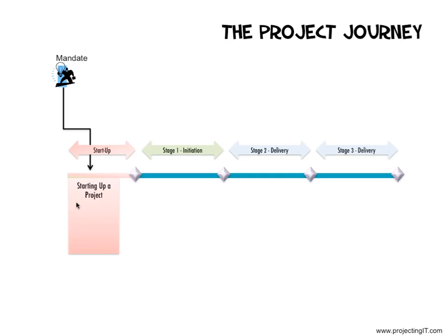All of this is defined in a PRINCE2 document called Project Brief. The project brief is used to decide whether the project should go into initiation or not. The project brief is submitted to the project board. The project board uses a process called directing a project. This process defines the activities to be done by the project board at different times on the project. The first decision made by the project board is when the project brief is available and the project manager wants to begin planning.